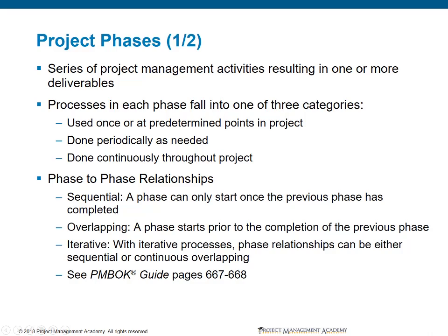With phase-to-phase relationships, some phases may be sequential. If we're getting ready to construct a skyscraper, it is unlikely that we are going to start excavating the foundation and laying concrete until we have blueprints completed. So we're going to wait until the designing is done before construction begins. But we may have some situations where we have phases that overlap.